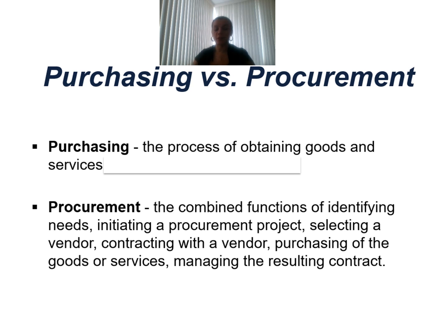What is the difference between purchasing and procurement? We went through the whole purchasing details and processes in the previous module, but remember that purchasing is a process about how goods and services are ordered. So the key processes in purchasing are raising purchase orders and arranging payments. On the other hand, procurement is more strategic. It goes through sourcing plus a strategic selection of goods and services. So the key processes inside procurement are researching, negotiation, and planning.